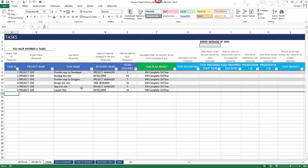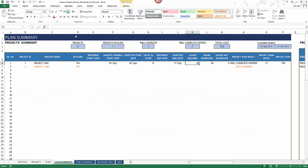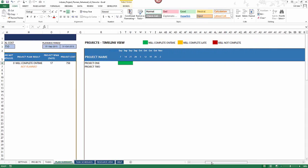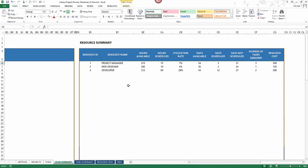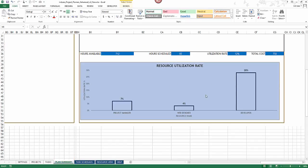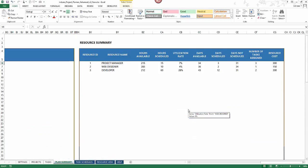Now that required information is entered, we can go to the plan summary to see two projects — one planned and one showing 'will complete.' The second project has no tasks entered yet. The plan summary shows costs, important dates, and a weekly timeline view showing where each project started and ended. The resource summary shows utilization rates: developer 28%, project manager 7%, web designer 4% — all automatically calculated.